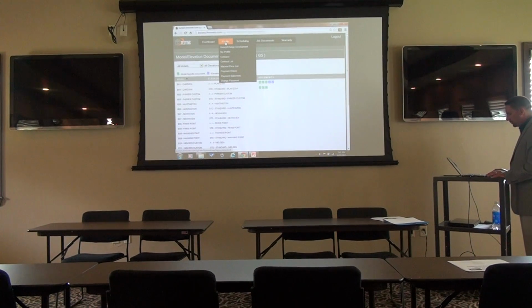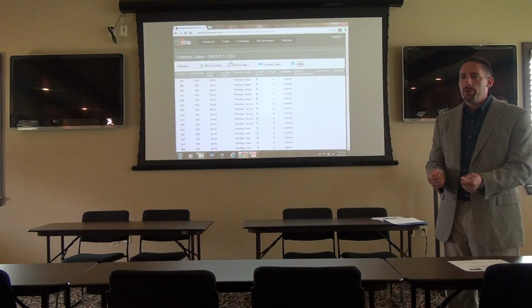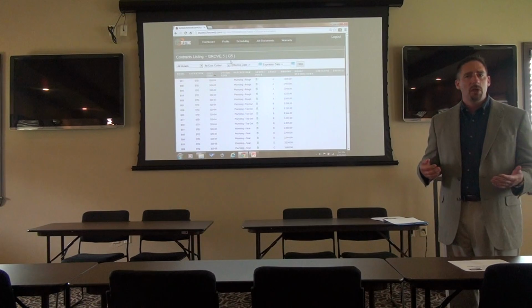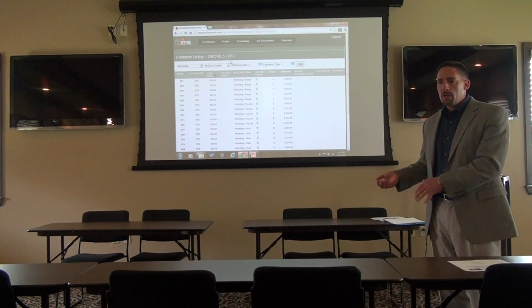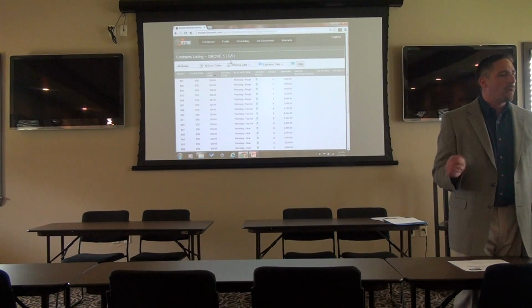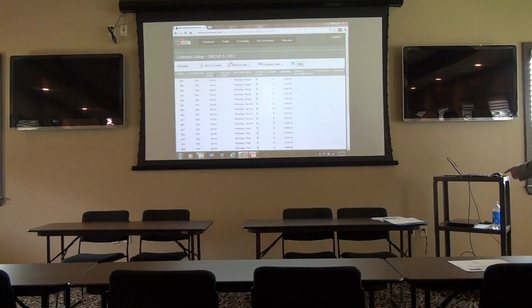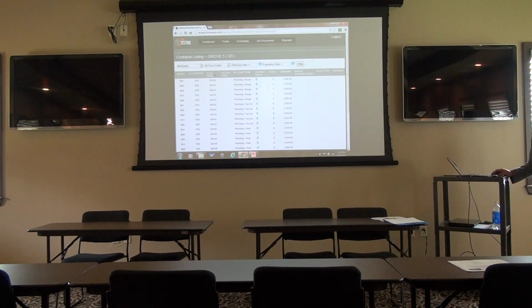Now, under profile, there's a couple other things. When you look at those plans and you fill out those spreadsheets and you give those bids back to the builder, then they'll probably work with you, or PBR will work with you on the price, get the price finalized, and then they'll import the pricing back into the system. And then they'll print that Schedule A document for you to sign, like we have examples of in your folders. And then for you, you can go on here afterwards and reference your pricing by clicking on Contract List. These are your contracts that are in the system.